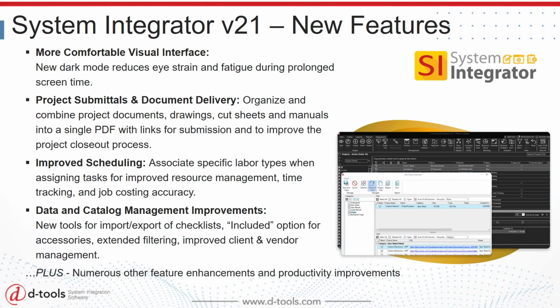As you build a project, we help you organize things by location, by system, and by project phase. As you add items to the bill of materials, we also track install times, and you can apply your labor rates so that you get a very accurate estimation of what it's going to take to deliver that job. That information can then be formatted into all client documentation: proposals, contracts, scope of work, everything client facing.